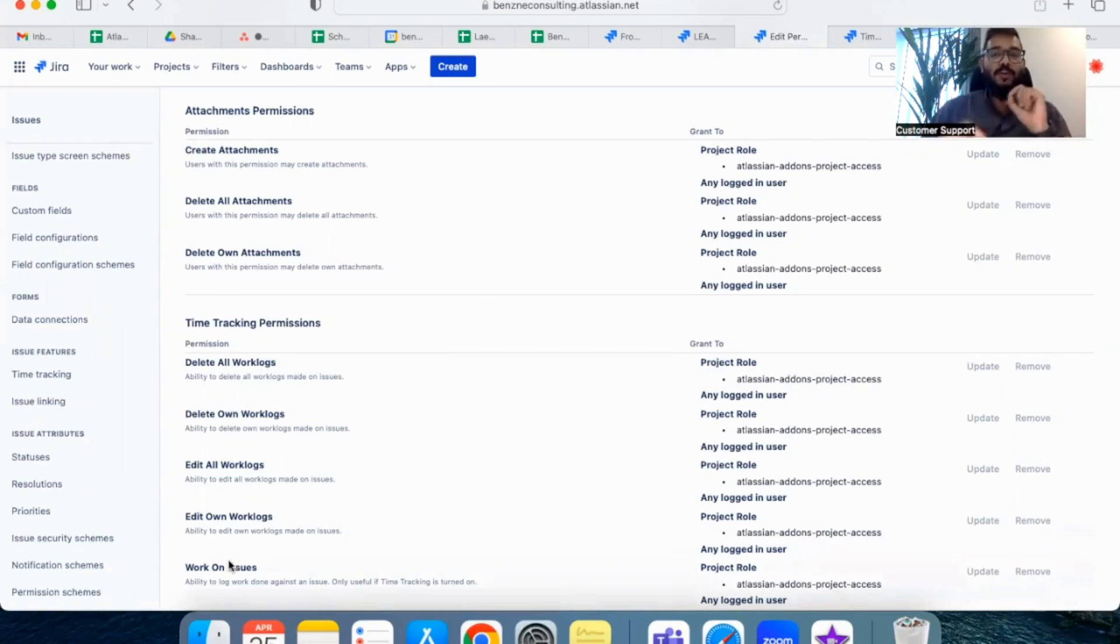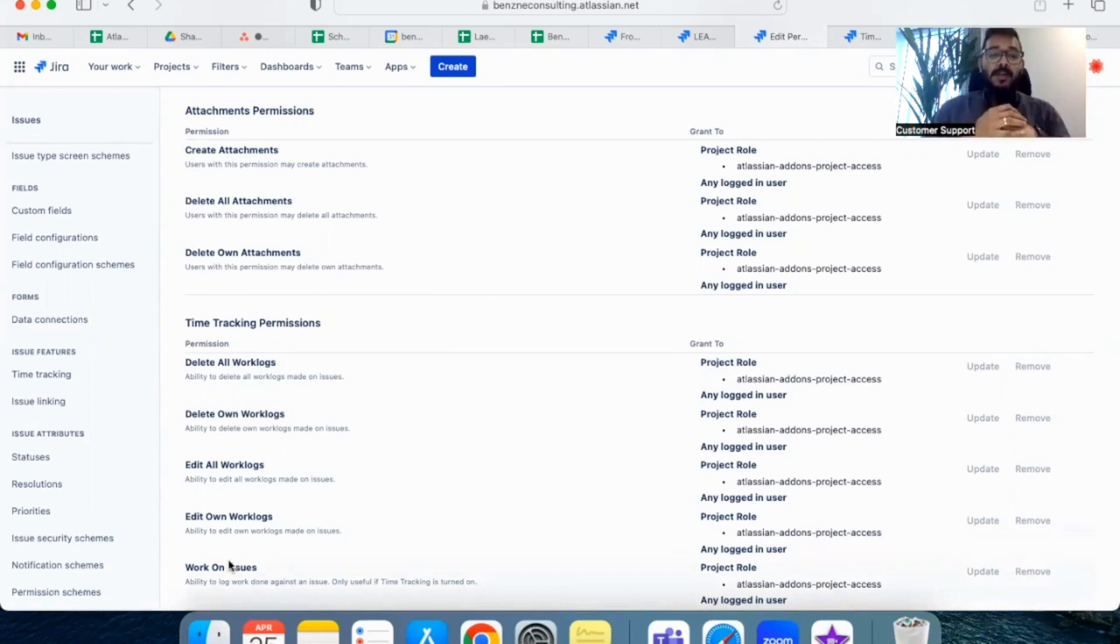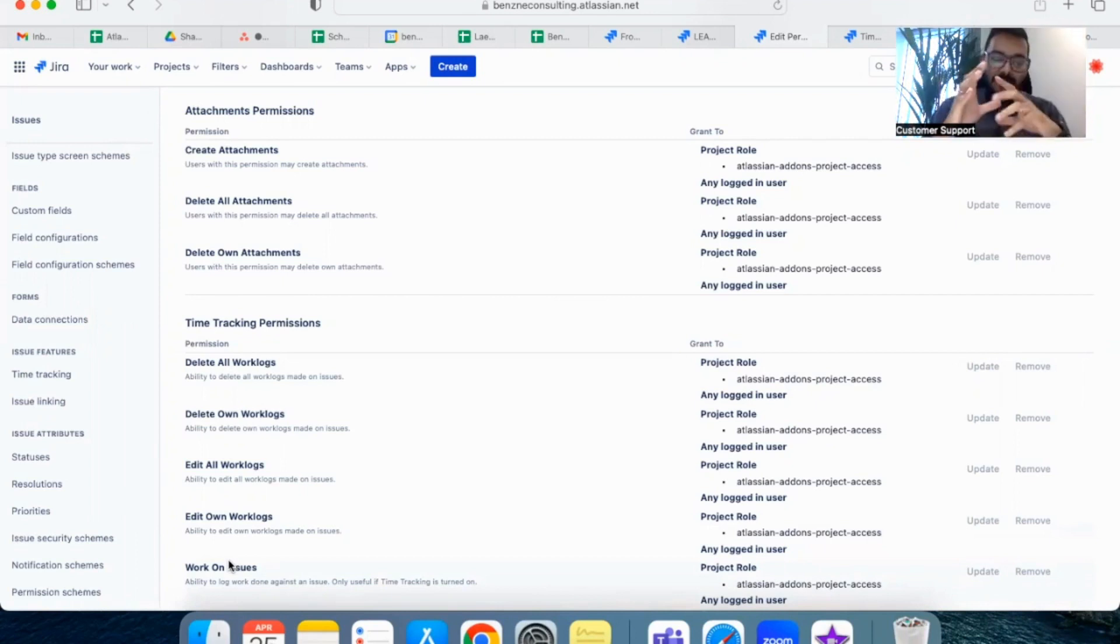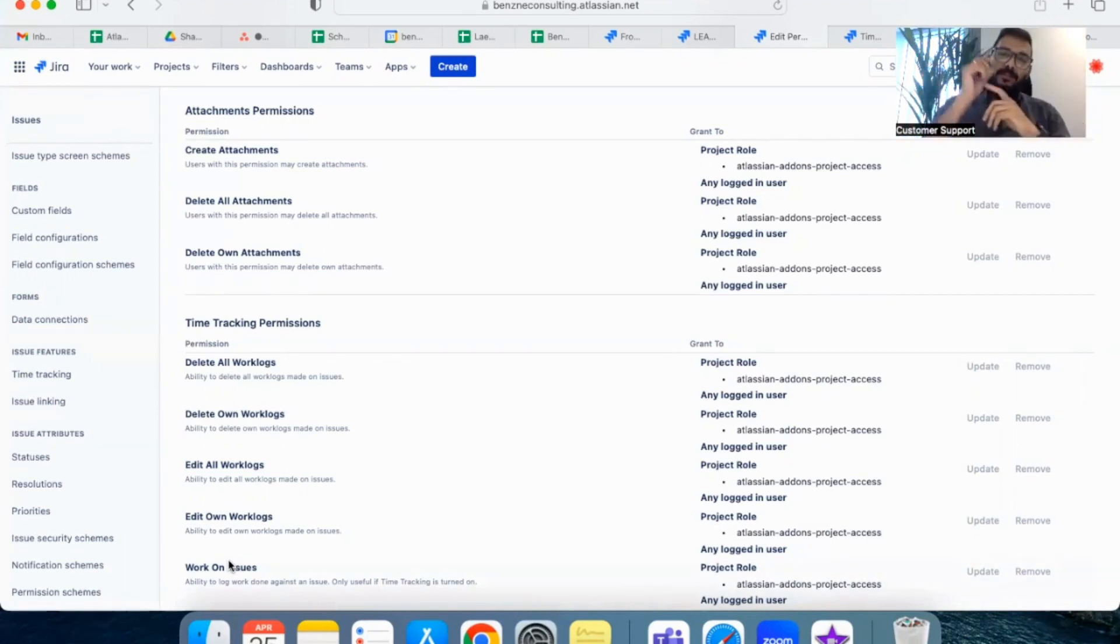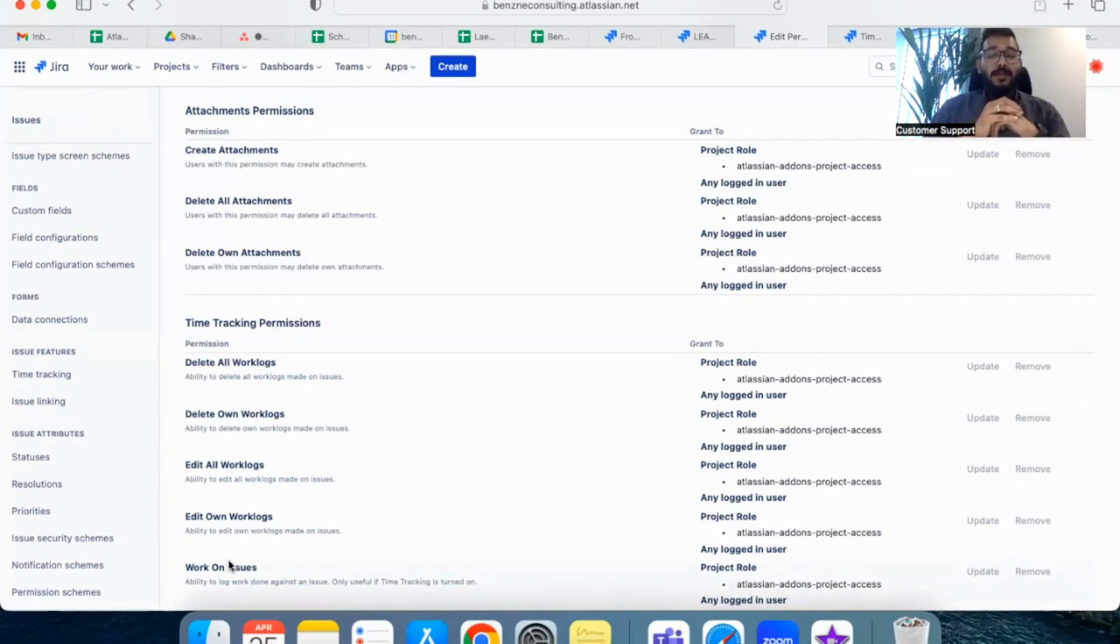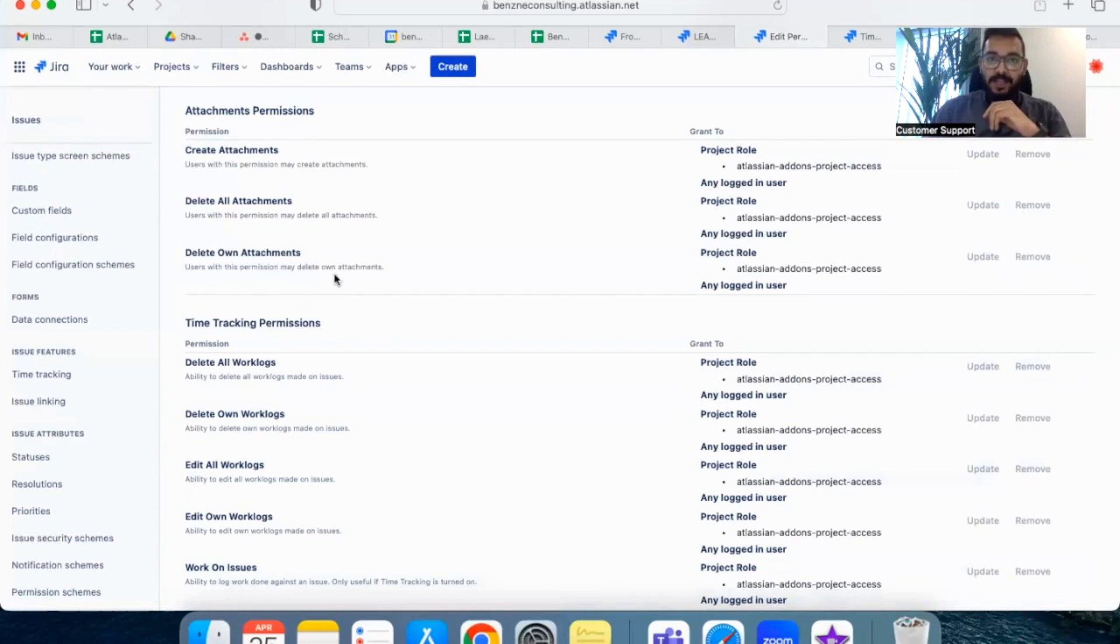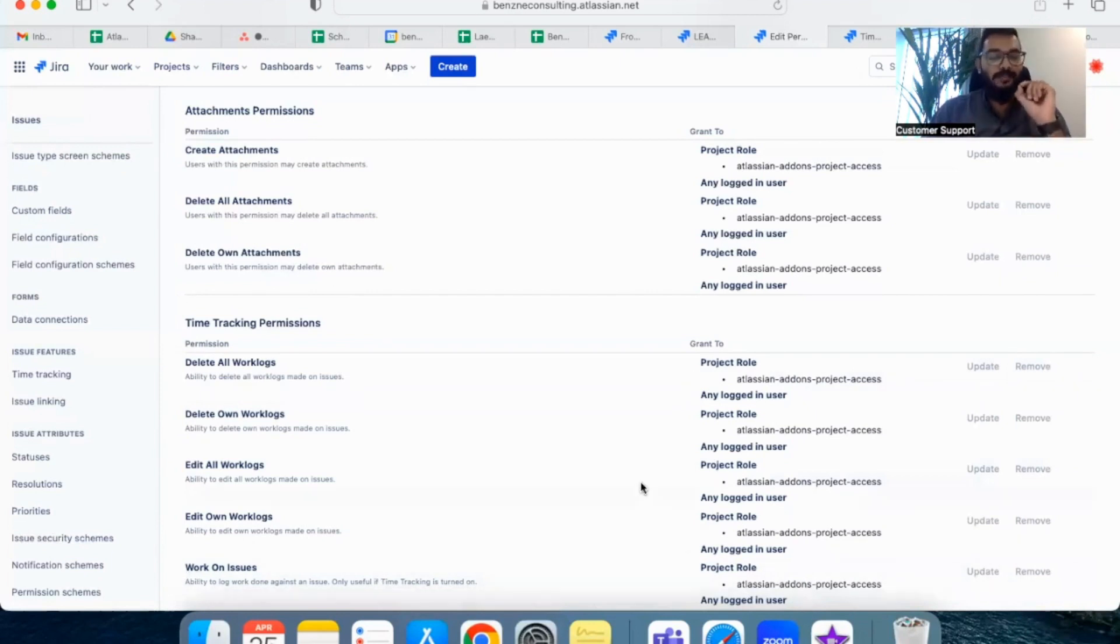Or if you are the admin of the project or super admin, go to your permission schemes in your site administration. From there, select the scheme which you want to enable time tracking for. And in that, if you scroll down, you will find this time tracking permissions. And in that, work on issues is something which you have to enable for that scheme.